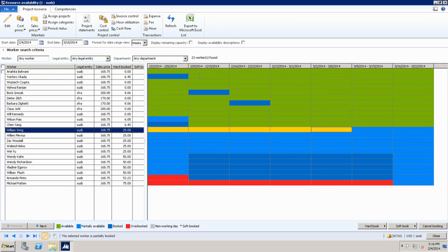So that's a very good question. It's the other way around. By virtue of the fact that you're assigning people to projects, they are being added to the project validation groups. Therefore, they can report time and expense against that project. Automatically, yes. I will show you. So two-way. Either you're assigning it to a project team, or you're assigning to an activity. In both cases, we are adding the resource to the project validation group.